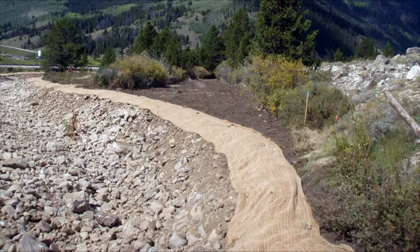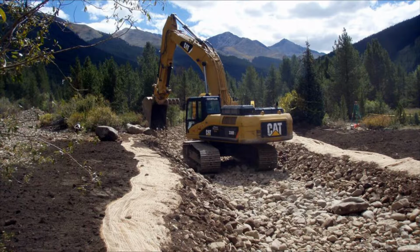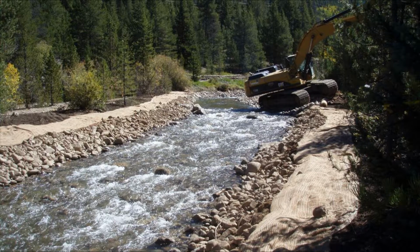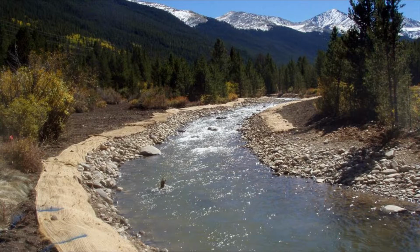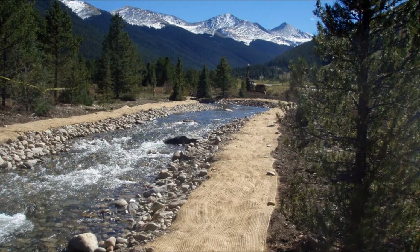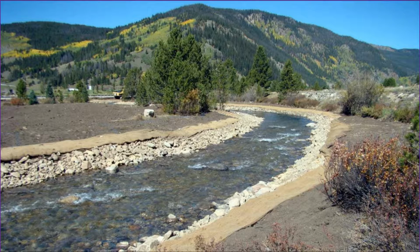With these funds in hand, the Watershed Group put the project out to bid to construction firms. The bids received were too high to allow the full project to be completed, so it was split into two phases. In late August 2013, construction began on Phase 1, the upstream portion of the area to be restored. The sequence began with diversion of the stream out of the way. Late summer is the beginning of the low-flow season, so this is easier to do than at other times.